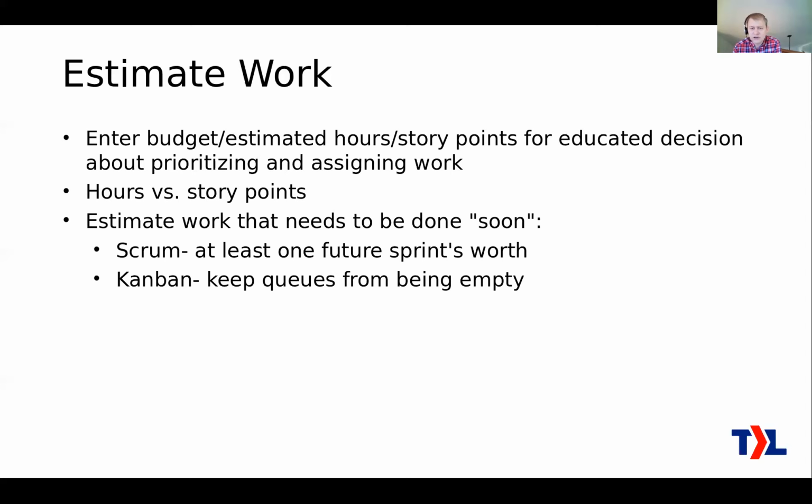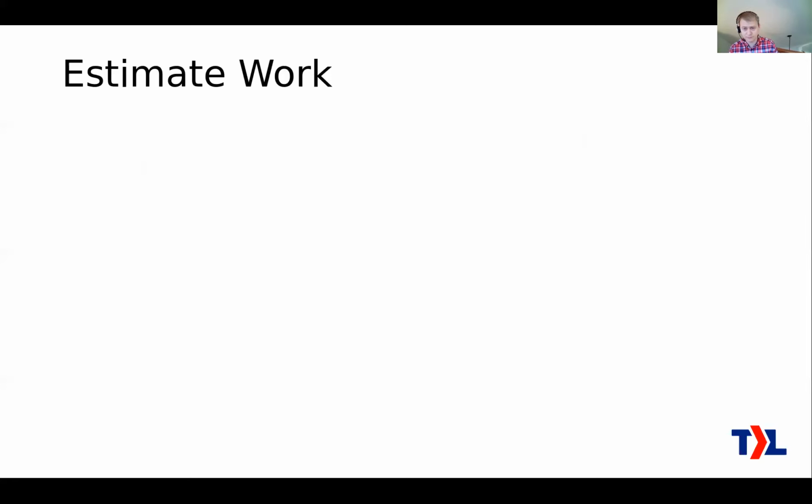How much of this do you actually need to estimate? Same thing as before. With Scrum, you're going to do one future sprint's worth. There's no point in doing any more than that. With Kanban, you just have to do enough to keep the queues from getting empty. If you find that your engineers look like they're going to run out of work soon, then you as a project manager have more work to do to make sure those queues don't get empty.